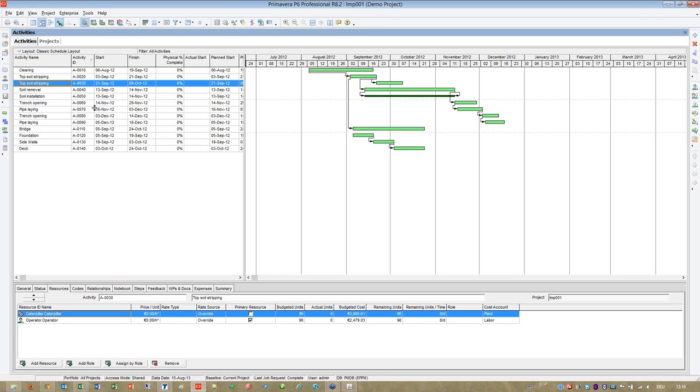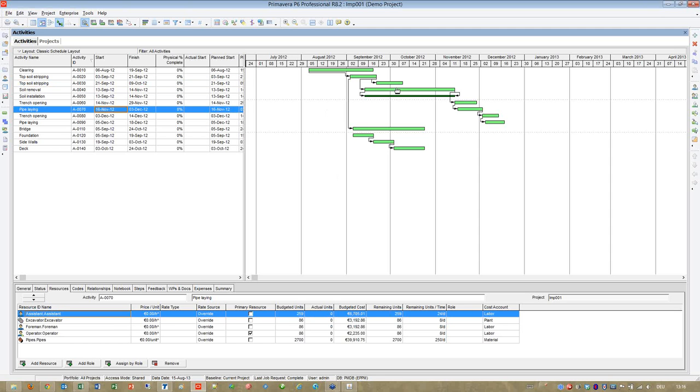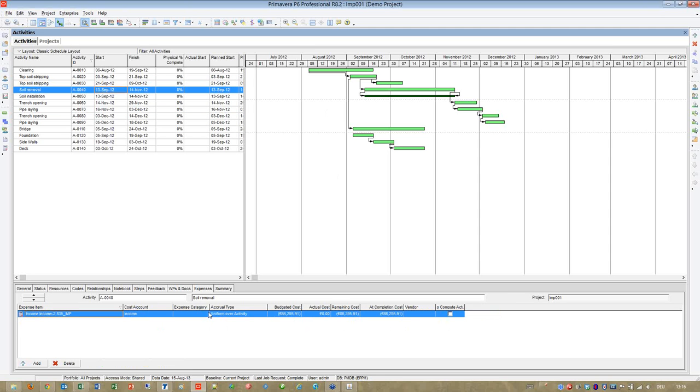The income that was modeled as a cost assignment, this we model as expenses. So here we got the income of 86,000 for this activity. So the result of this data exchange is that you can prepare a project completely inside TILOS, and you can merge this with all information about links, calendars, WBS structure into a Primavera project.